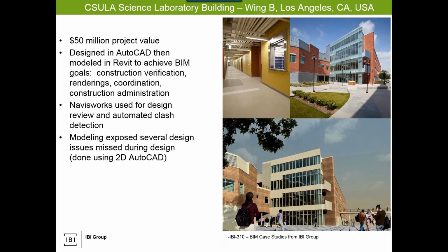They were able to identify clashes upon completion of design prior to sending it into construction. You could imagine saving it all in the virtual world as opposed to trying to address clashes during construction. So they used Navisworks here to review any automated clashes that were detected.